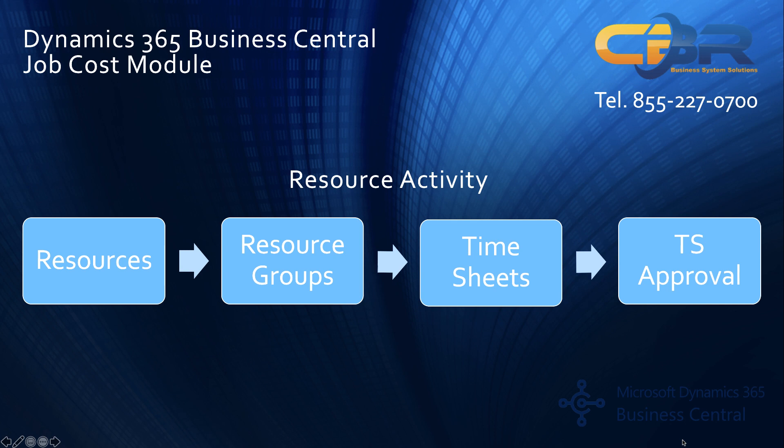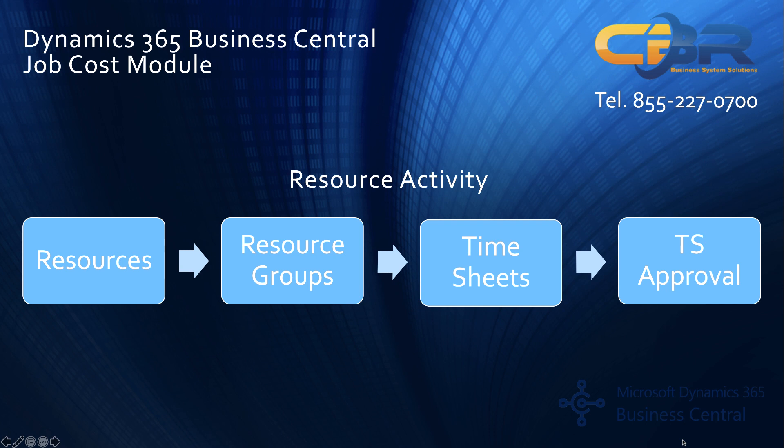Once you get past the resource configuration and group setup if applicable you then can record timesheets and you can define approvers for timesheets. So people working on a job can be assigned to a timesheet approver that approver would get notified when the timesheet has been completed and the approval would then release it for billing purposes to the rest of the team and the rest of the module.